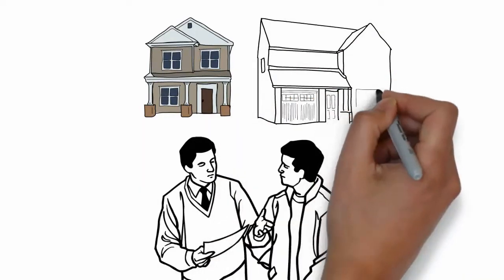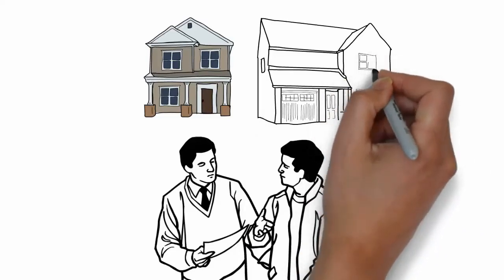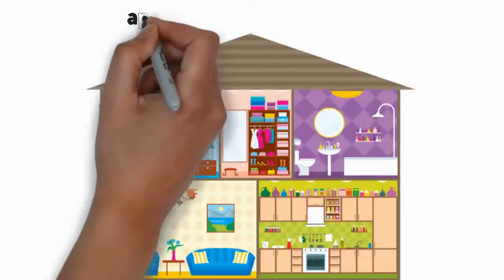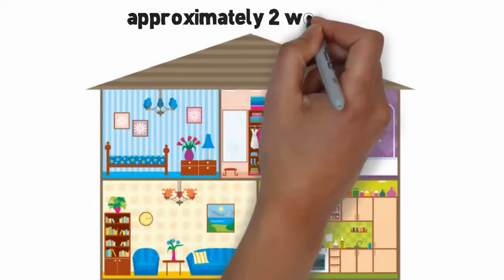Any items that come in higher or lower than our presented budget will be noted on a change order. Change orders must be signed by both you, the customer, and us, the builder. We usually have 2 to 4 budget drafts before we get to your final approved budget. This gives you ample opportunity to add, change, or delete items.